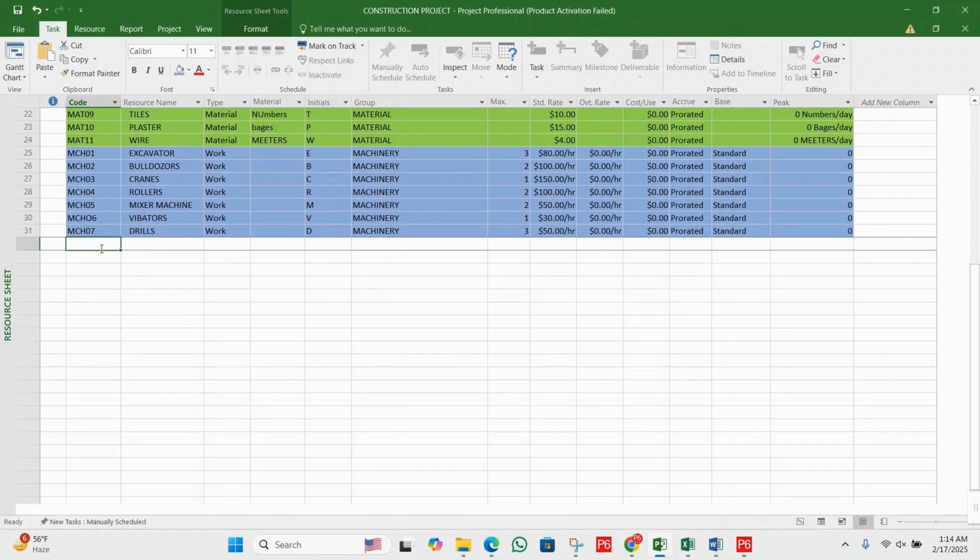Okay, so let's add some more examples for cost, like the training, transportation, traveling, residential expenses, medical expenses, like that. And we can also use the miscellaneous. We can create one miscellaneous account for those small expenses which we usually have but don't use a proper head for.